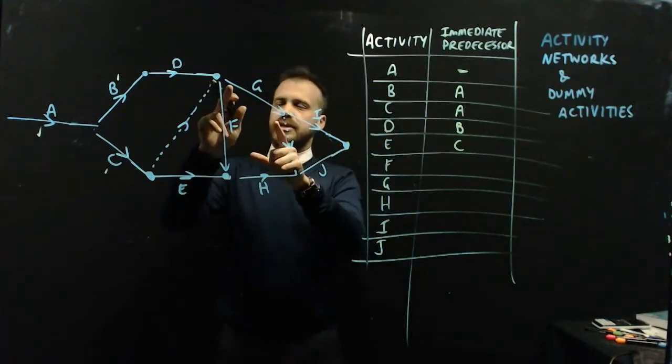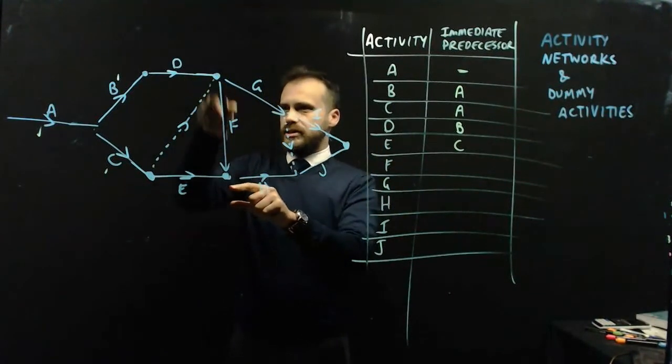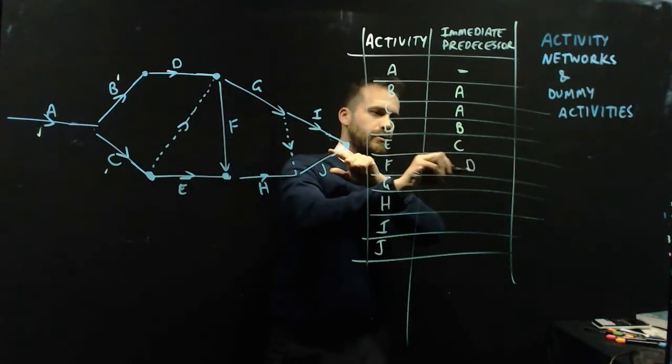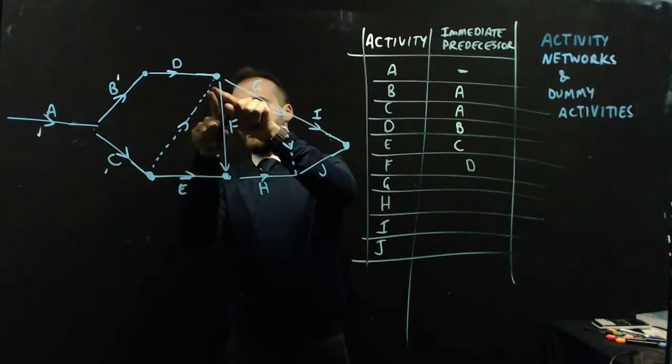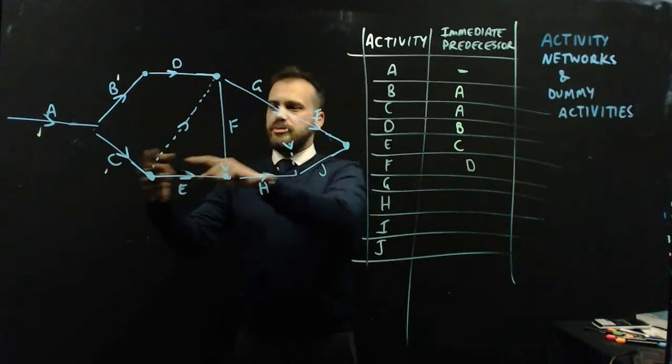Let's look at F. So F is an arrow going downwards. And before F, we have D. But we also have this dummy activity, which is kind of the zero activity, the C plus activity. It's the activity that's leading from C.